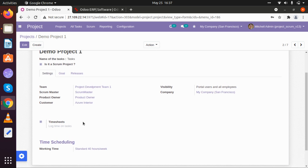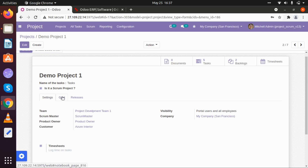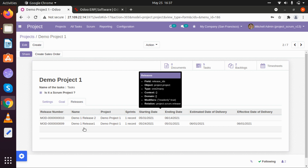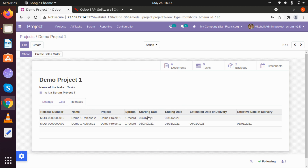Under which company we are using that project, and if we are going to log some time sheets on our project then we can add those details here. In another tab there is a Goal, under which we can add some basic goals of our project — which goals are to be completed at the end of the project. Under the Releases tab, we can add release data: on which date that particular release started, on which date it ended, and what was the estimated time of delivery.